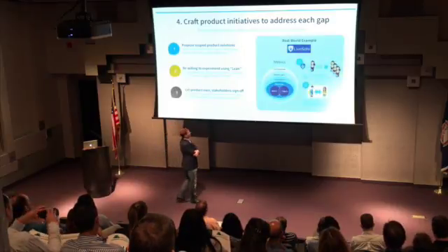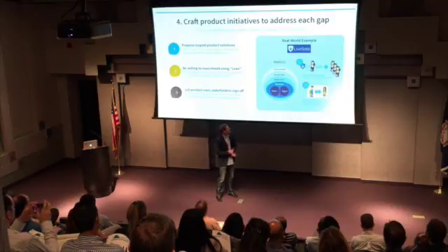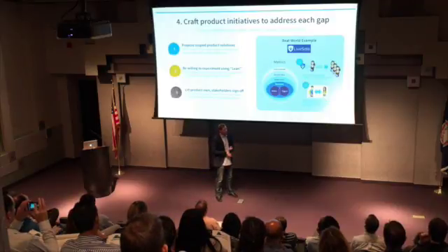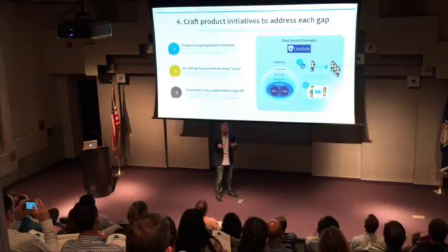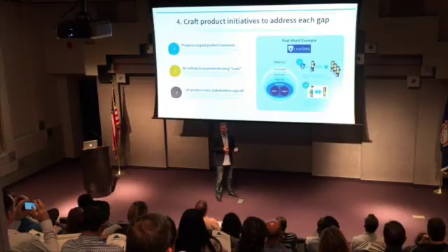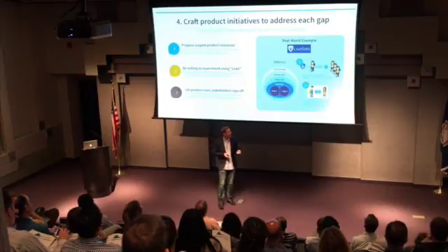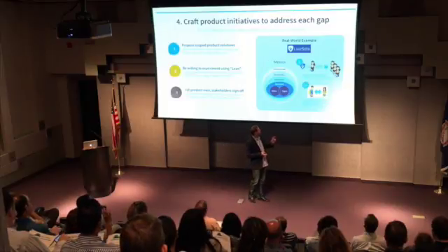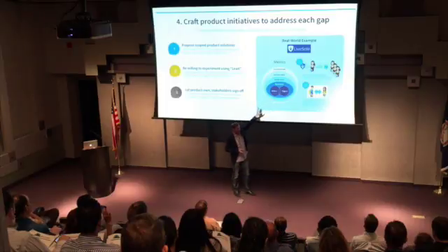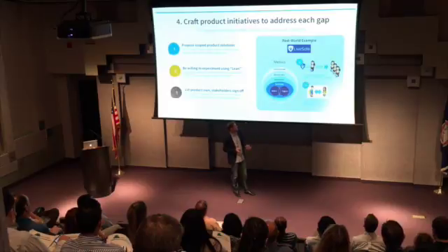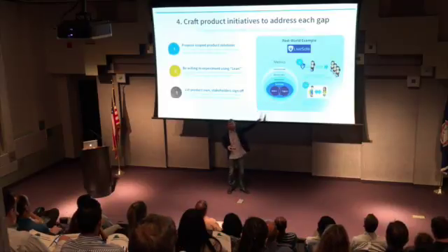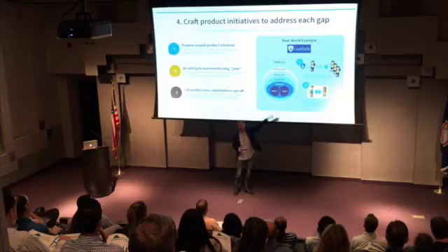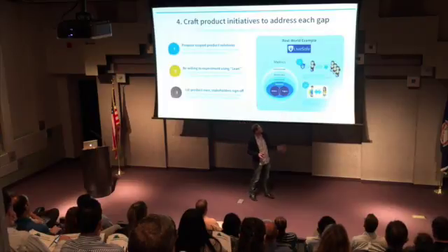A real-world example from a company over in Arlington is LiveSafe. What we were doing when we tried to come up with the right solutions on this was we identified a major gap around engagement. What they want is broader, deeper use of the application a year after people have downloaded their mobile app. And the way that they could do that was we had to identify these critical touch points. So the first thing is we wanted to make sure that we understood exactly how we're going to measure that. We're looking at total downloads, monthly active users, weekly active users, daily active users. We're looking at the actions that those users take and the triggers that they generate to try to drive engagement from other people. And those kinds of triggers should drive the following kinds of engagements, right?